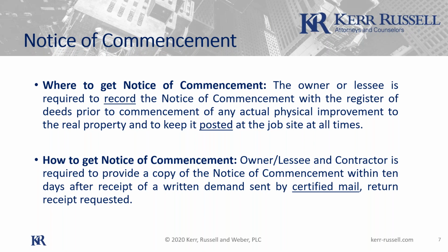The supply houses, like electrical and lumber companies, have people in accounting departments that are trained to do these steps. This is the first one that is incumbent on you folks to do, which is to send out a certified mailing requesting the Notice of Commencement. The next one is the Notice of Furnishing, which we'll get to in a minute.